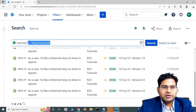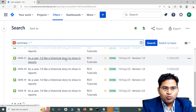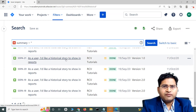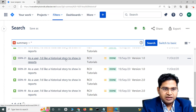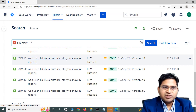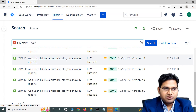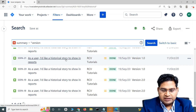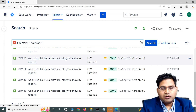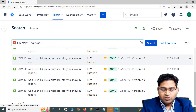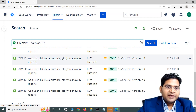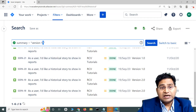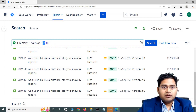There is also a wildcard concept. Say for example a story is written for Windows 10 or some particular version of an application. If I know that in the description there is a version specified, I can search for 'version 1.' and then use the star (*) as a wildcard — that's not an operator, it's a wildcard — so it will match anything after '1.', returning all versions starting with 1.